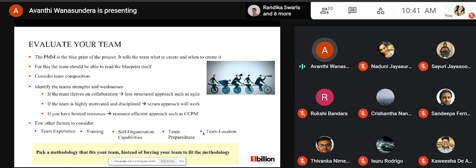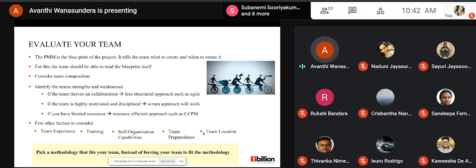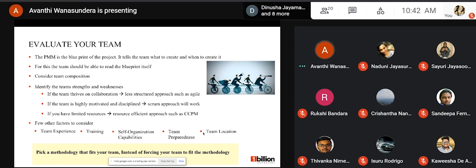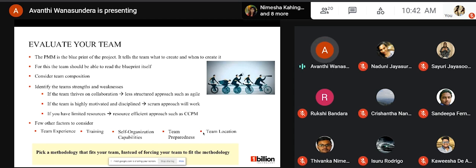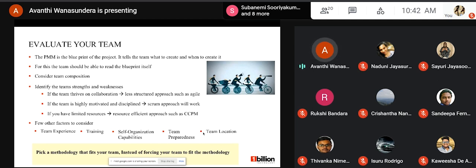If the team is highly motivated, disciplined, and skilled, a scrum approach will work. If your team has limited resources, a resource-efficient approach such as the Critical Chain Project Management methodology should be used. Other factors to consider include team experience, training needs, team preparedness, and team location — whether they are remotely located or co-located. In summary, it's best to pick a methodology that fits your team instead of forcing your team to fit the methodology.